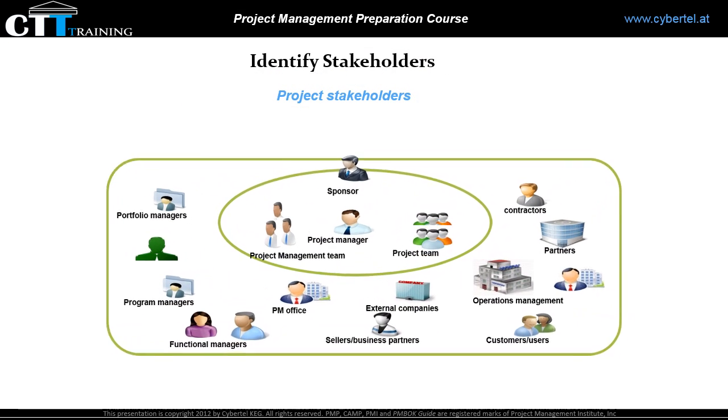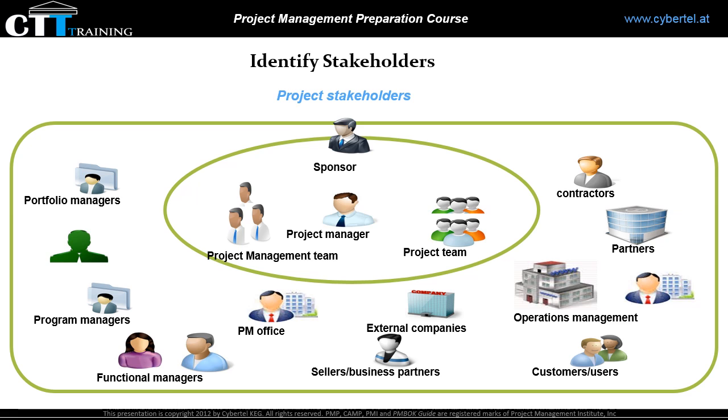Can we remember this figure? Those are the well-known stakeholders in most projects, internal and external to the organization. Those persons or groups may have a negative or a positive impact on your project. You have to collect information about all stakeholders that are relevant to your project, and that could even be the public. You should also determine the power of the organization's internal stakeholders. For instance, is the person a functional manager, a senior manager, or a line worker? Each of them has a different power, interest, and impact on the project.